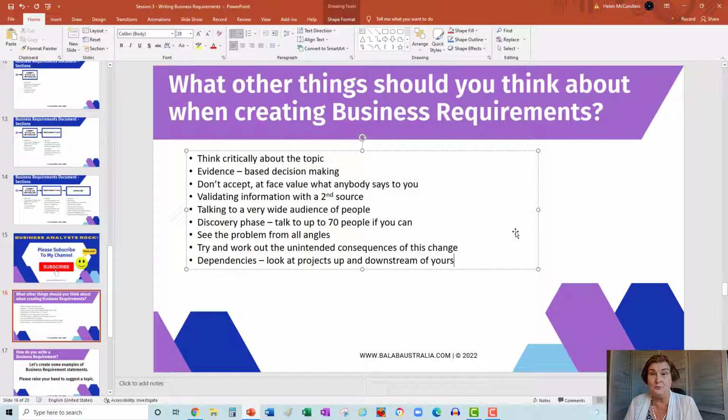or it's just not deemed important, you need to be able to sit in that meeting and tell the project manager, Project 234 is depending on us to create this so that they can deliver X. What can we do about that? Your project manager can go talk to theirs. They can work out, is there a workaround? Do we still need to do it? That decision's not really yours. But what's important is for you to do due diligence to tell them so people know that you're not just floating like an island. There are interdependencies. All right? So that's quite a bit to think about, isn't it?